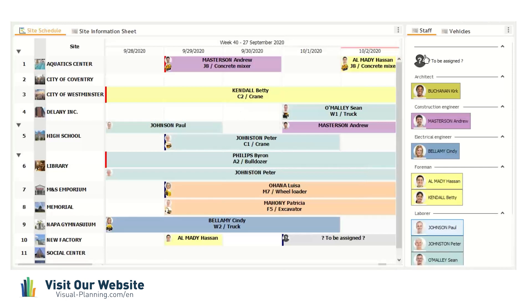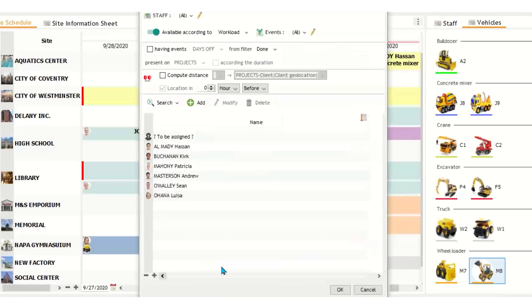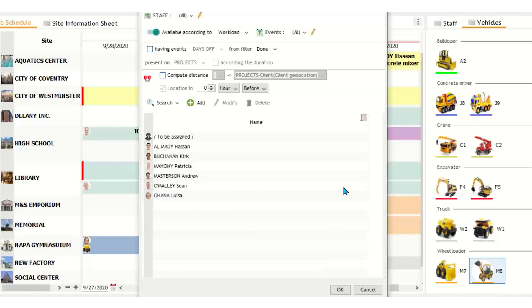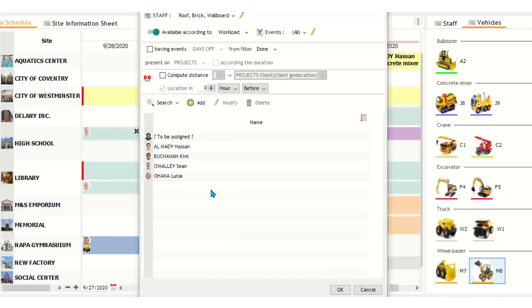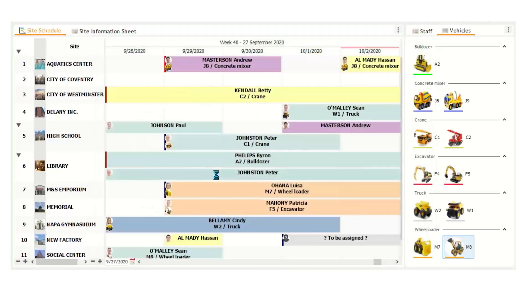We can also do it another way by clicking on the vehicles tab. Let's pick a vehicle here, wheel loader for now. Click drag, and let's say we're going to assign it to social center. Here a window pops up that is showing you only staff members that are available to work according to workload. If I click this off, it'll be your full list. This is describing only the staff members that are available to work during those two days. Now we can go even further, where if we click on the filter tab here, let's say we just only want to see people that have the skills for roofing, brick, and wallboard. So now only these four people can now work for the duration of this task that have those skills. Let's say we're going to assign Sean.